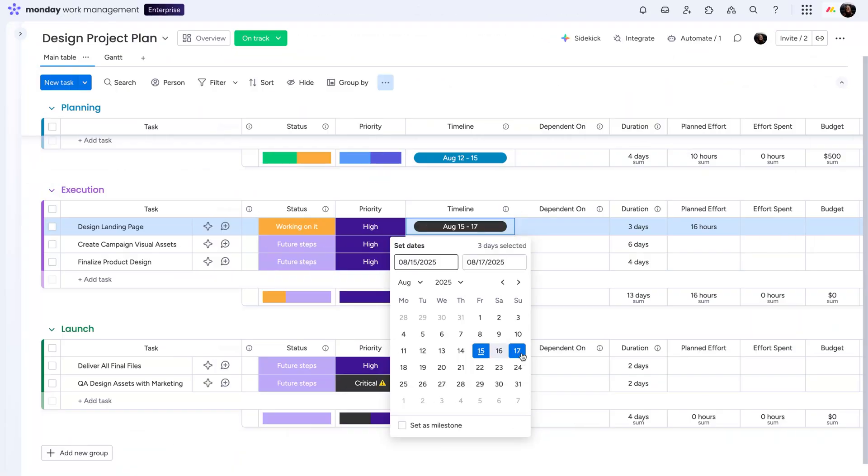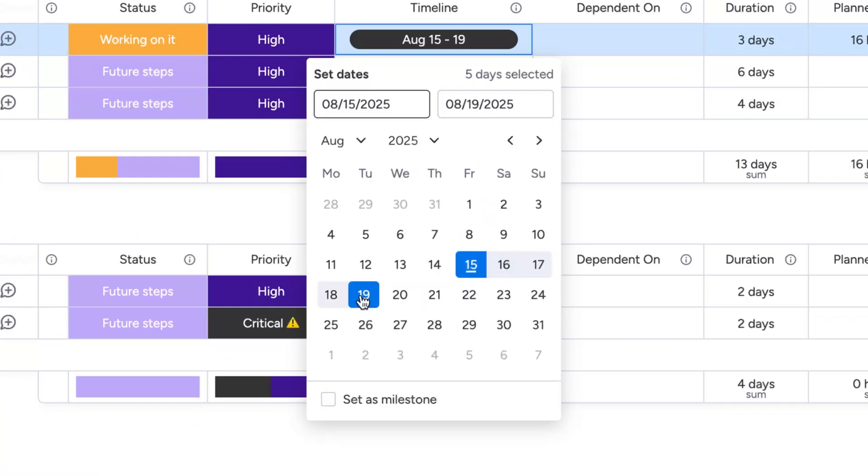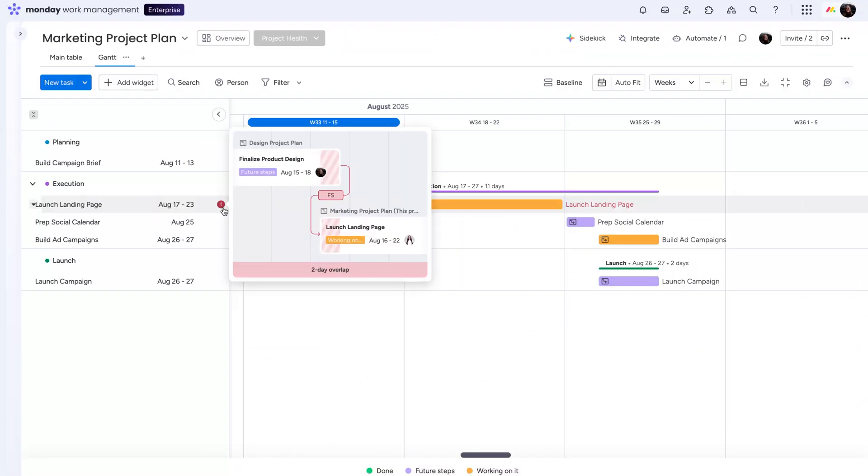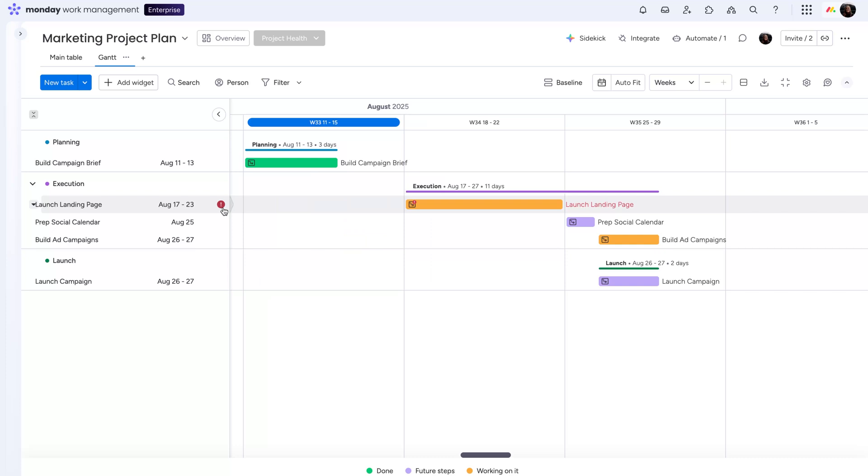Maybe your product design ran two days late. You'll see that delay flagged in red on the marketing timeline, making it easy to adjust your campaign tasks before things snowball.